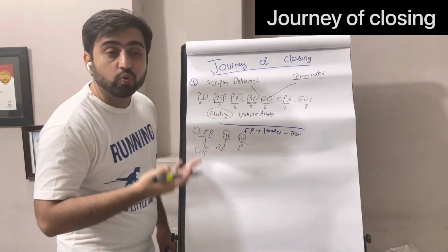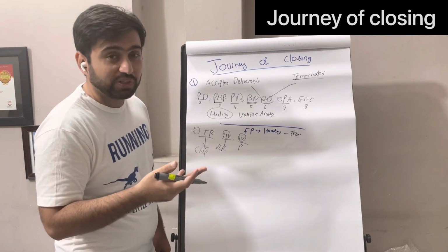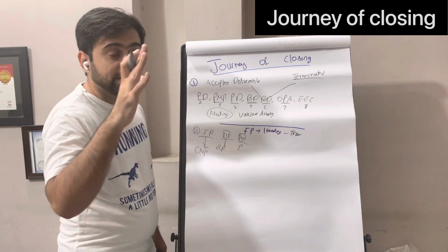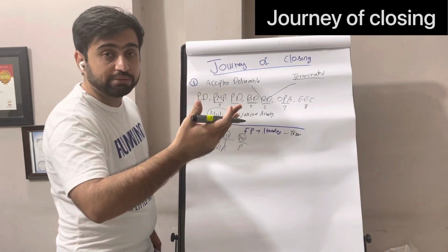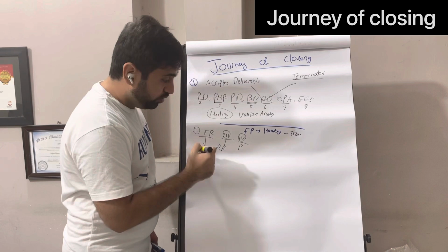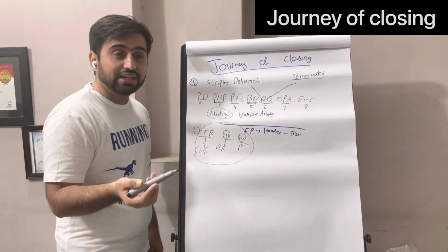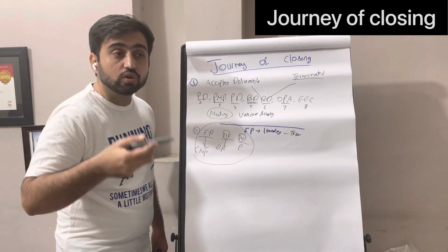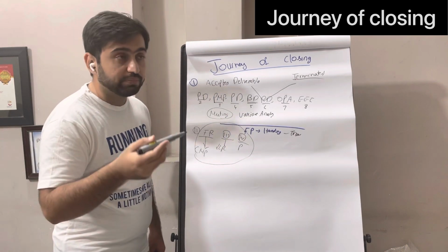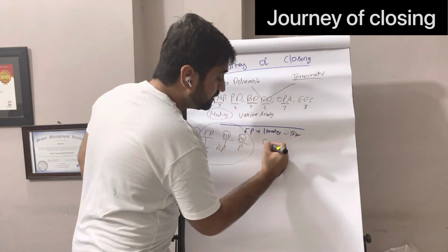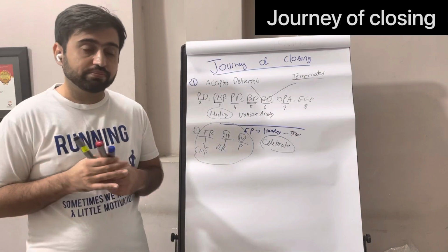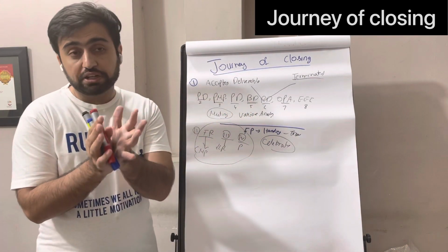Hey guys, who will write down these things? Project manager? No. So you need maybe 20-30% of the team there, but this depends again on your team management plan, resource management plan. But you cannot release the entire team. Even if the project is terminated, you need to update all those things, get the lessons learned, update the documents archive, close in a professional way, do administrative closure, release the team, and finally you need to celebrate the success.